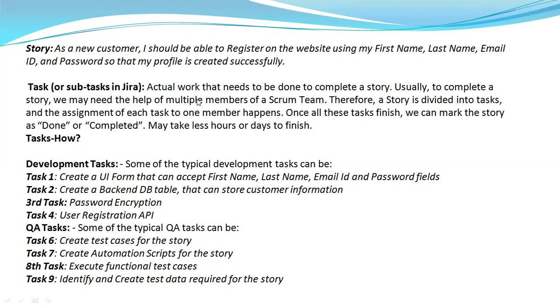Let me reiterate the same example here. See here, the development task. When it comes to the development task required to complete the user story mentioned above, as a new customer, I should be able to register. See here, task number 1 is you need to handle UI as well as backend, right? That means front end as well as backend. First, you should create a UI in such a way that the user should be able to fill up a form. That UI form is one subtask. Okay, that is one task. And creating a backend DB table that can store customer information, that is the second task.